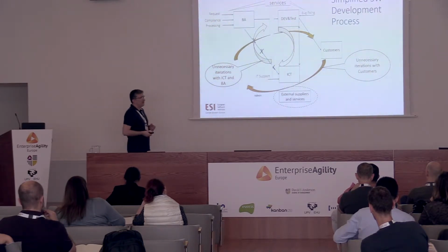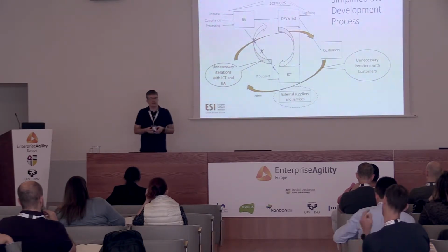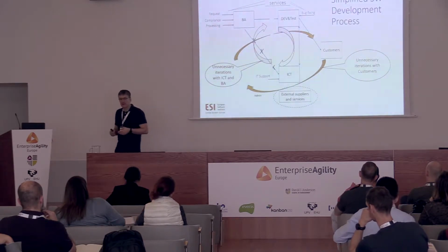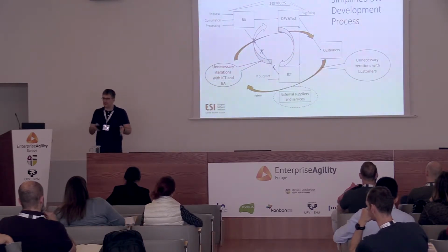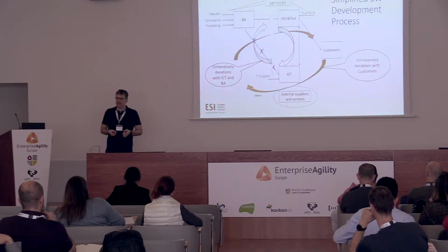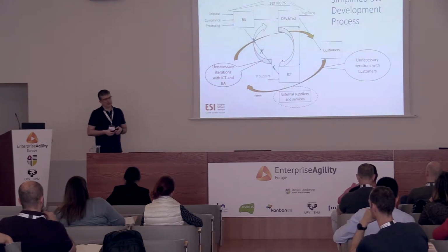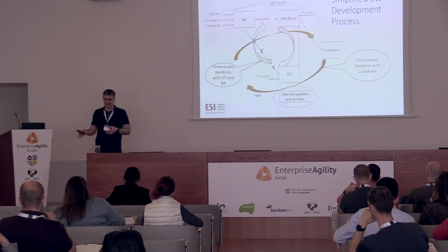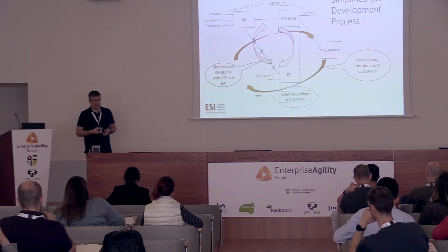Then we have compliance. These are requests with a fixed date. They should be completed by a certain date, because in the financial industry, this is a non-banking financial company, but they have these kinds of regulatory deadlines. They cannot afford to miss the deadline because they will be fined. They will have to pay a penalty.